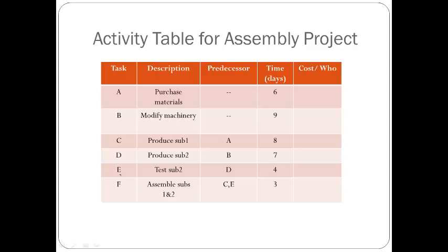When the table gets very big, you look at the predecessor part, and F is not in it. So A, B, C, D, E, only F is not there. That means F is the last activity. So that's the one that we're going to finish, so it goes to end.